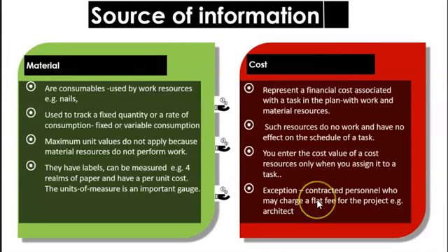Now there's an exception. If you do terms of reference and you send out for a consultant to do a particular task, and they send in a proposal proposing a certain fixed amount of money for the entire work, you would have it as a cost item rather than a work item. They are not being paid for every hour or every week or by the month. They are contracted to be paid a particular flat fee.